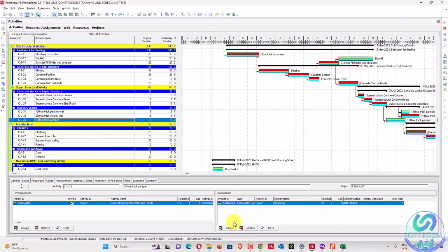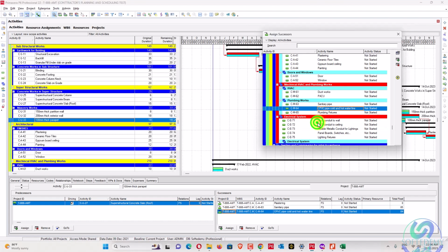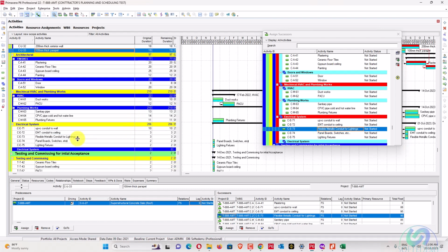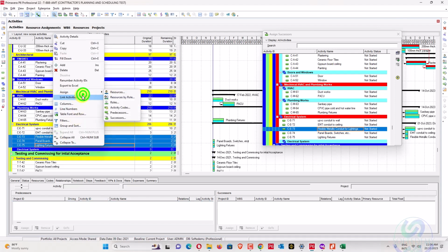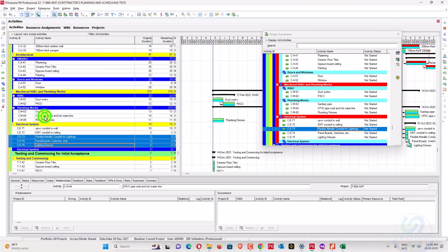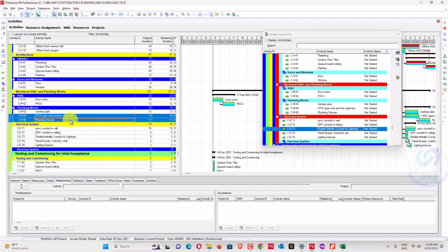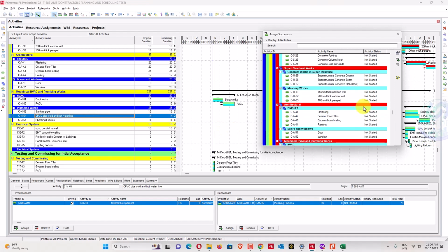You can say this one here. You can see here sanitary, CPVC, UPVC, this conduiting, this metal conduiting. So after that one, this lighting fixture can be linked, link this one. And now after CPVC, you can perform this plumbing, link this one. So after performing that CPVC work, you can complete your plaster work.